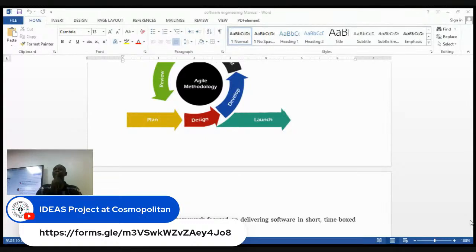So that's one way to define it. But another way to define non-functional requirements is those things that the person did not say, but you can dig out by your information gathering. We've given an example severally. Let me remind us the example again. Antibola said, do a software for me to manage my office. That's what she said, and that is the functional requirement. When you are gathering information, you now ask her, where do I deploy this software? Is it here? Is it on phone or on system? It is also a non-functional requirement because she did not say that. You are the one that finds it out.